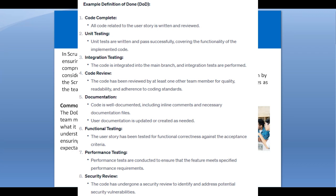The product increment is basically the end product of the sprint. Definition of Done is a comprehensive list of criteria that must be satisfied for a product backlog item to be considered complete and potentially shippable. The Definition of Done is agreed upon by the Scrum team during sprint planning or at the beginning of the project, and it evolves as the team learns and adapts.